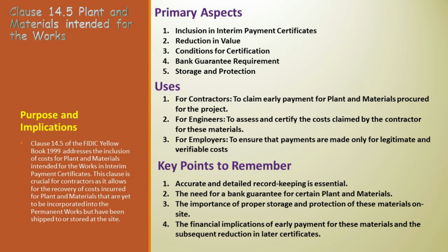Financial implications of early payment. While early payment provides financial relief to contractors, it's important to understand the implications. There's a reduction in the value of these materials in later payment certificates once they are incorporated into the permanent works. This process ensures a balanced and fair financial arrangement throughout the project lifecycle.